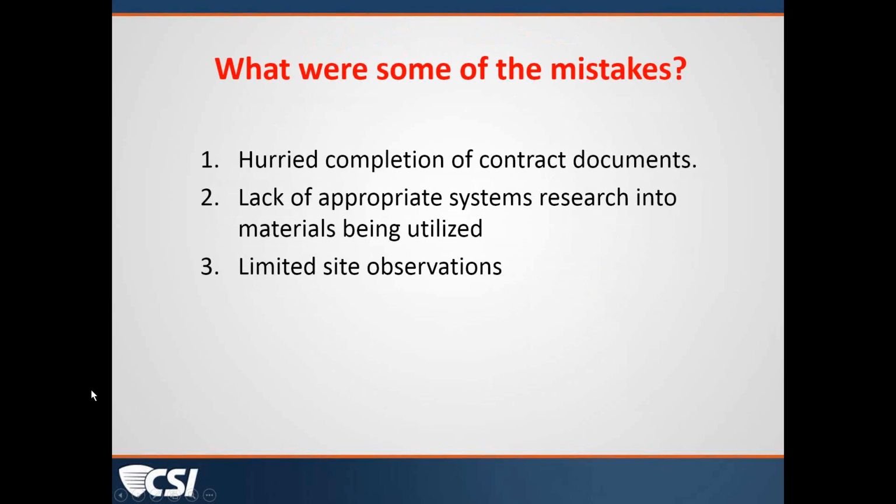What some of the mistakes were here is, again, it was a timing issue of hurried completion of documents. There was a lack of appropriate systems research to be sure that materials being used were compatible with one another in some of the detailing. And there were limited site observations because of the contractual relationship that led to this issue occurring.